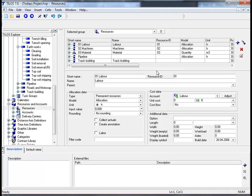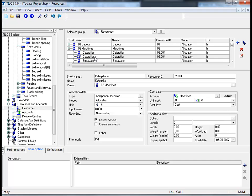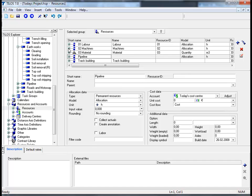Tylos is also capable of taking complex resources into consideration—a mixture of resources. If we, for example, click on the plus symbol next to machines, we can see that we have a number of tasks which also include operators. Tylos takes equipment and an operator, but also things like gasoline and diesel into consideration. All these resources stored in a hierarchical manner have one thing in common: they can be assigned to any tasks and activities in the main working area of your plan, and this is something I'm going to show you how to do next.